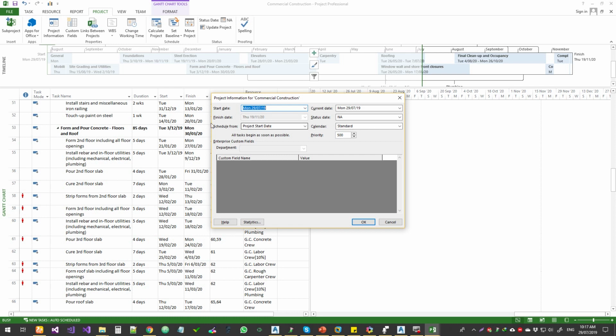That means whenever you start creating a task, the flow of the task is from the start date till the end date. So if you choose it as from the finish date, so that your deadline is constrained, that means you cannot go past the deadline, and then you can schedule the task based on the deadline. It's a bit hard to work this way because you have to work in reverse, but if that's the problem, then you have to work in that way.